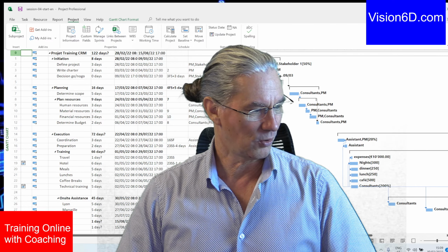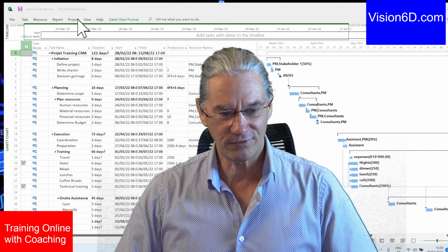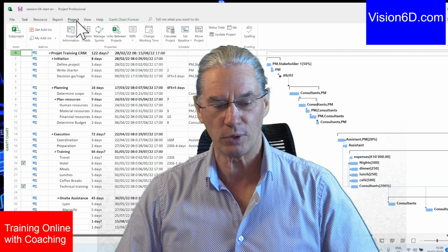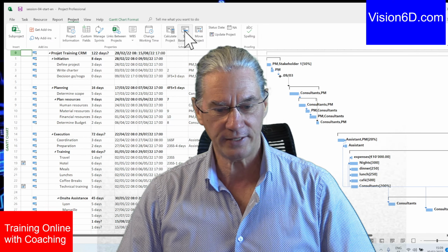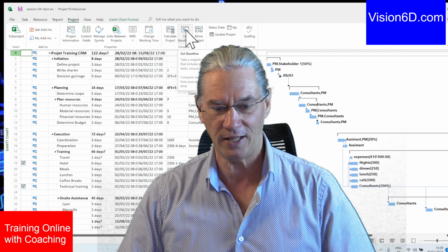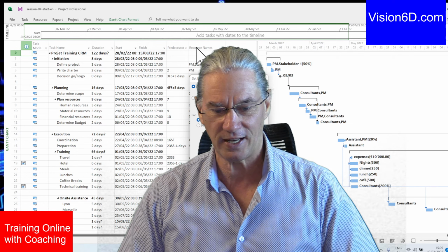And what I'm going to do is, if I want now to do the baseline, you will see with msproject it's really simple. Behind me here on top there is a button called Set Baseline. I click simply on that button. I do a set baseline here.